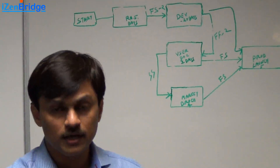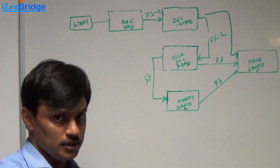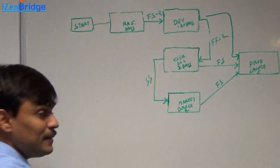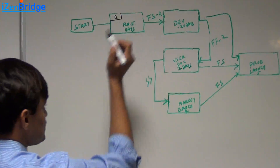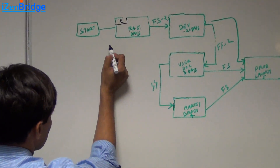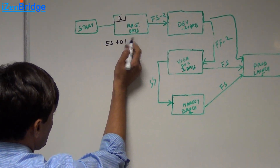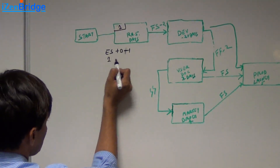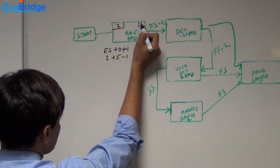Let's calculate the early start, early finish, late start, and late finish dates of these activities. For requirement analysis, we are starting on day 1. Since it is taking 5 days, the early finish is early start plus duration minus 1, which is 1 plus 5 minus 1 — so we are finishing on day 5.